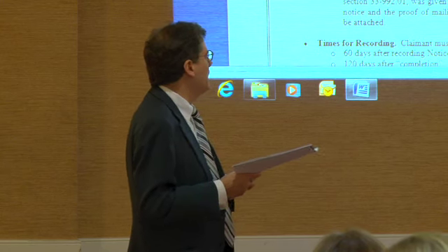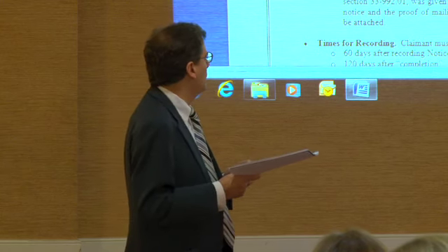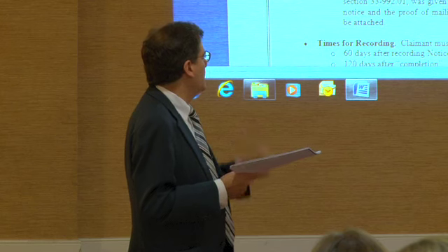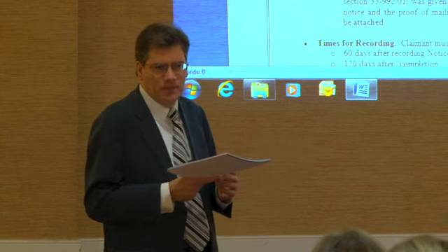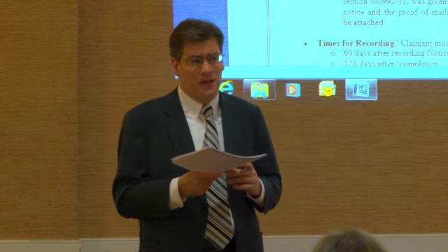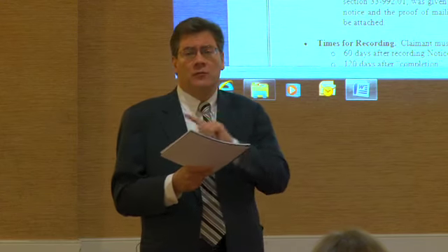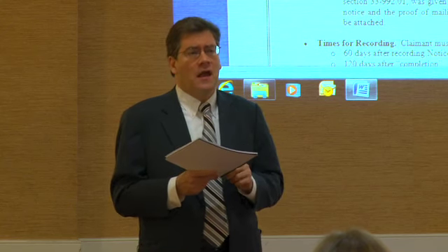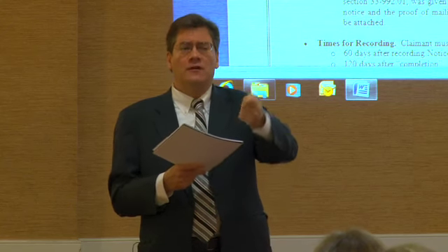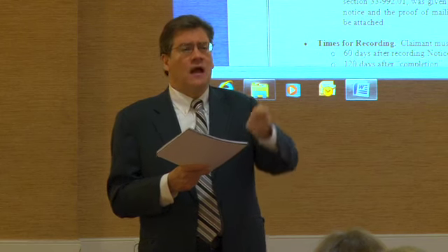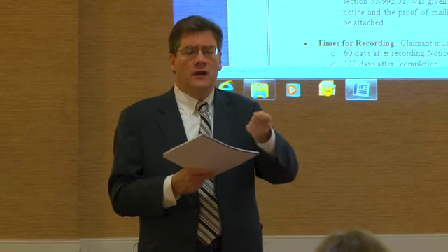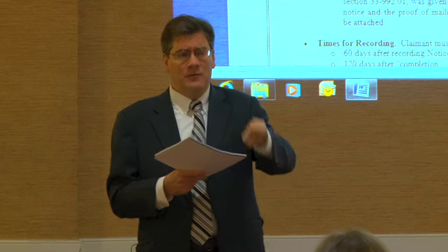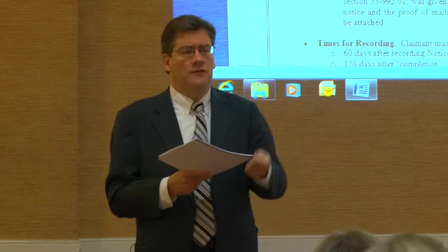A statement of the date you sent the preliminary 20-day notice, and a copy of the notice and the proof of mailing shall be attached. All right, what's proof of mailing? It's an affidavit of mailing as to the date that the preliminary notice went in the mail. And then it's the preliminary notice as Exhibit A to that affidavit, and the certificate of mailing or other proof of service that satisfies the statute as Exhibit B to the affidavit of service.